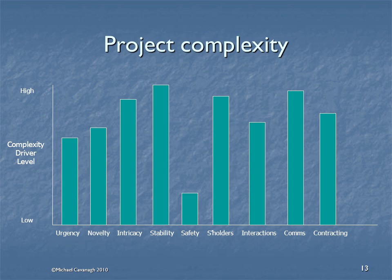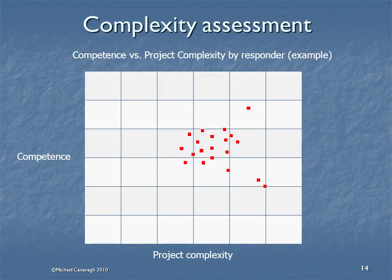We then produce a scatter plot of competence versus complexity by responder. This scatter plot gives us an idea of the level of consensus, and it also positions us on a project complexity matrix.